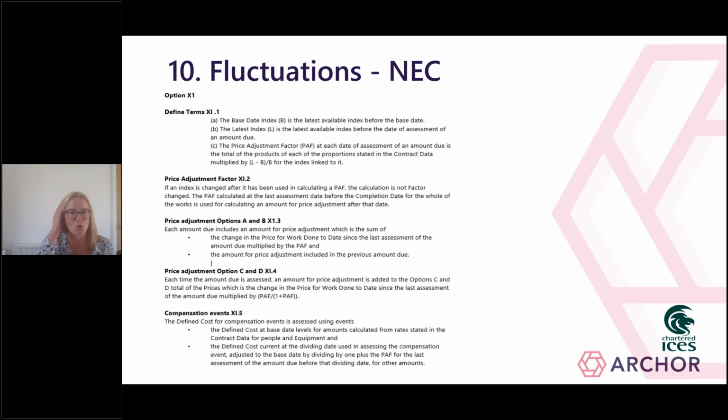One thing I'll say is this clause is not normally amended, and it does actually only provide for one option for fluctuations. It's based on index price adjustment against inflation, so it is actually pretty limited in use, and is certainly pretty hard to administer. I've in fact just had one client ask me a question about an option X1 in one of their contracts, and having looked through it, in fact it is amended, looking at the detail, it does look pretty tricky to